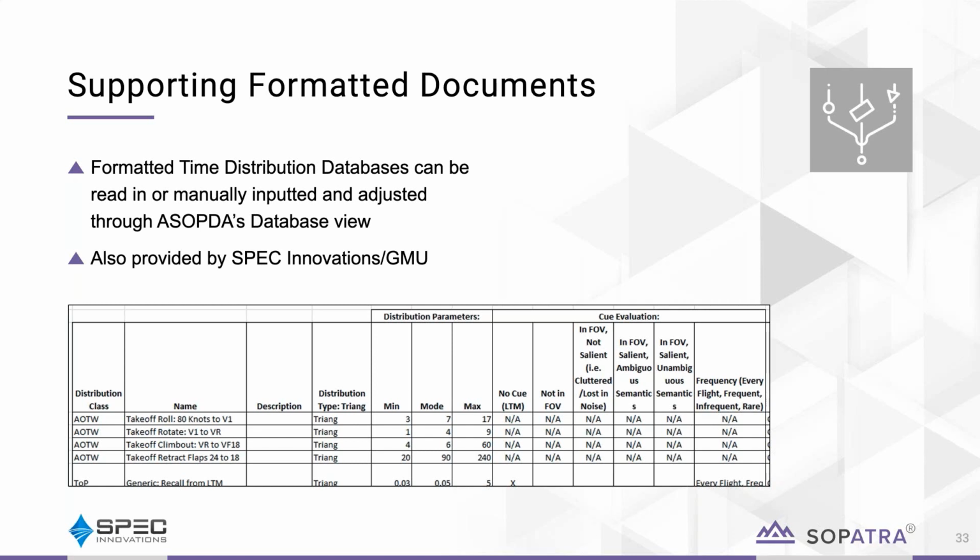A triangular distribution is used a lot in this, because that's the best estimate of what you can do in many of these things. There aren't enough data points to create some other kind of normal distribution. If you've got those data points, great, but otherwise you can usually make a good estimate too.